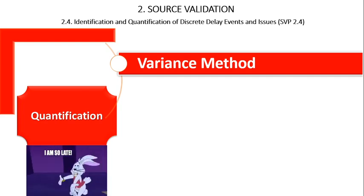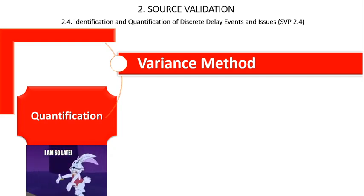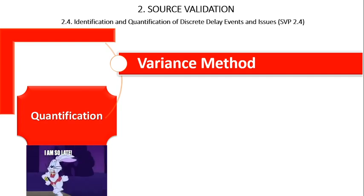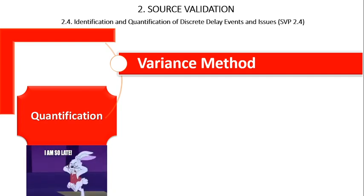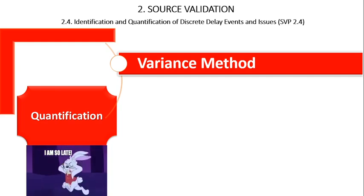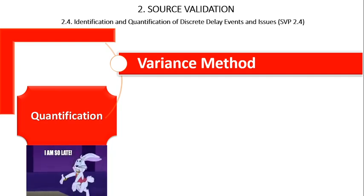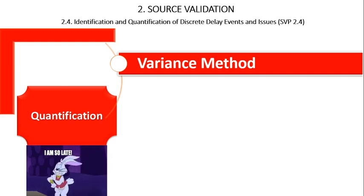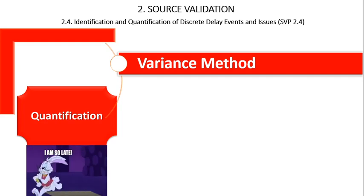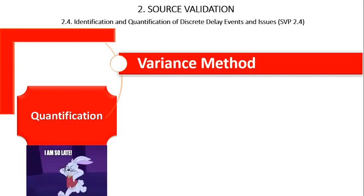The variance method is purely mathematical in nature. Two figures — a planned and an actual — are subtracted from each other to compute the variance. These two figures may be dates, durations, or productivity measurements. Thus, the entire variance needs to be tied to one or more causes for the variance.